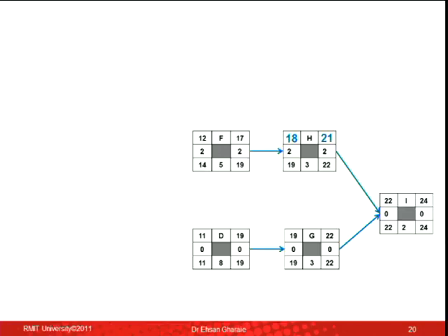Is there an impact on the next activity? Is there an impact on the whole project? When you can delay, when you've got a flexibility in an activity, if you use that flexibility, there is no impact on anything else. It's just the activity that is delayed. This float, this slack, is called free float.